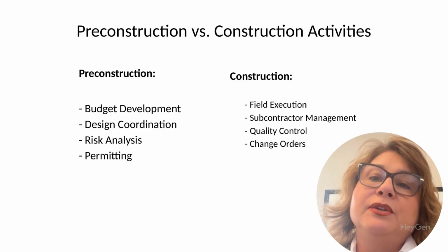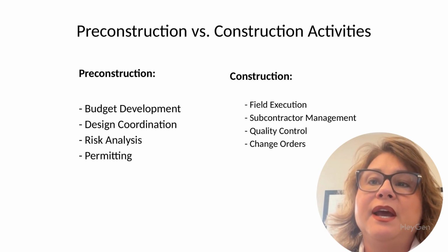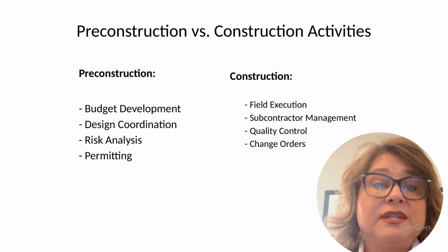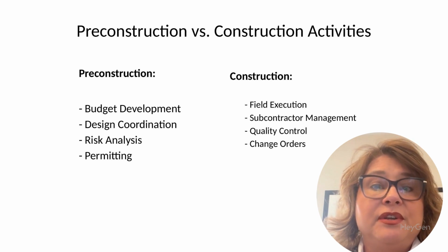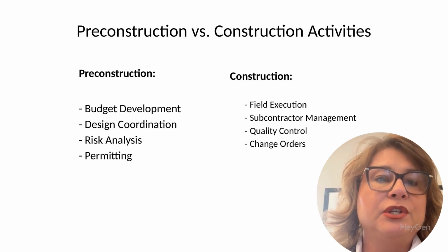Let's compare pre-construction and construction. During pre-construction, we focus on budgeting, design coordination, risk analysis, and permitting. Once construction starts, it shifts to field execution, managing subcontractors, quality control, and change orders. Strong pre-construction work leads to smoother construction later.